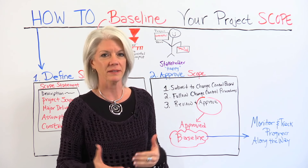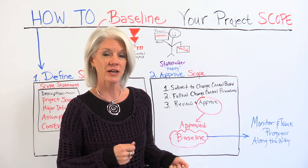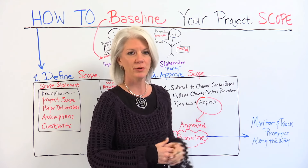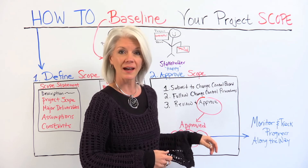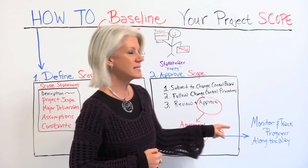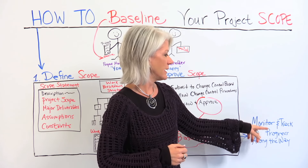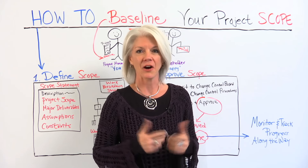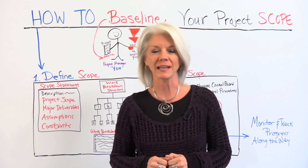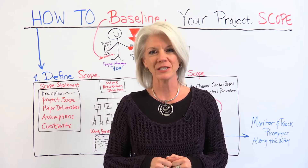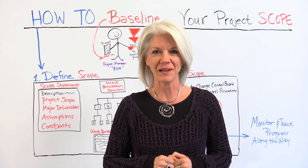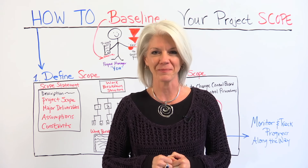They make sure the scope is agreed upon and meets all of the objectives. If there are any changes, they address them at that time. But once they approve it, that's our baseline. The baseline is then used to monitor and track the project all along the way. If you need a tool to help you baseline your project scope, sign up for our software at projectmanager.com.